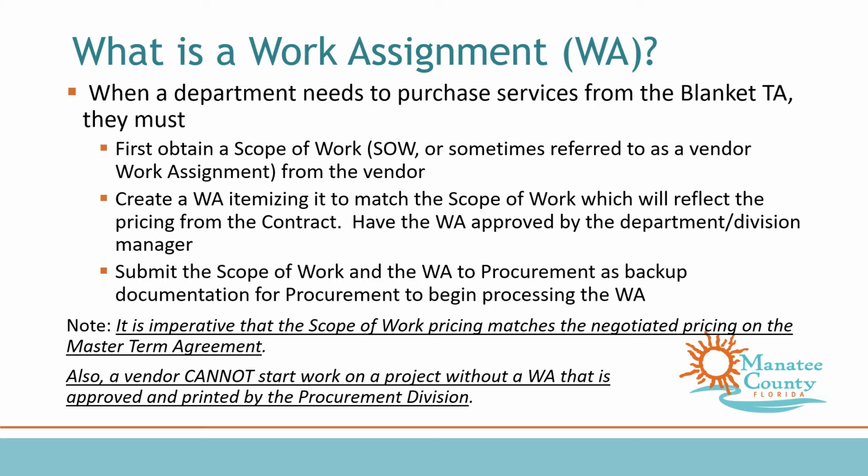Also, a vendor cannot start work on a project without a work assignment that is approved and printed by the procurement division.